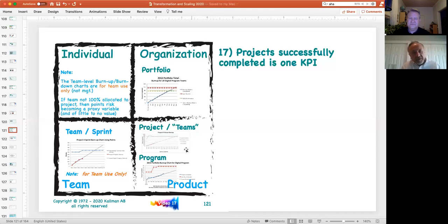But then we consolidated them together for the product or the program, where I combined them all based on the product's backlog. We could start to estimate how many points. We were using an estimation point back then for our stories, for our epics. The team had decided on a scale that they would use, but based on that, I could then plot how many points, and I knew what the availability bandwidth was for our team in terms of how many points we could actually achieve in a given, in this case, a 2-week sprint. Based on that, I could graph where we are in terms of the program, how many points we've accumulated, and what our backlog set of where we need to go to complete the program. So that was a good report, I think, for management to show where we were in the program.